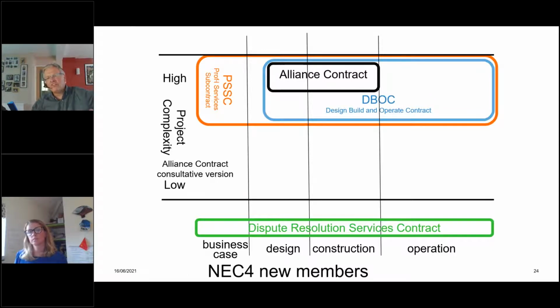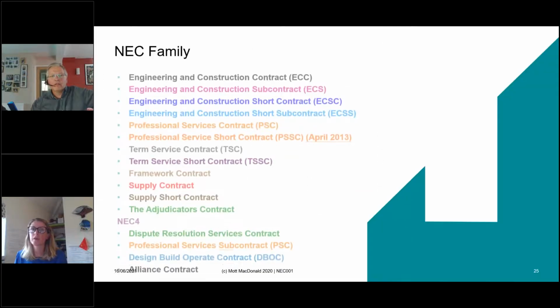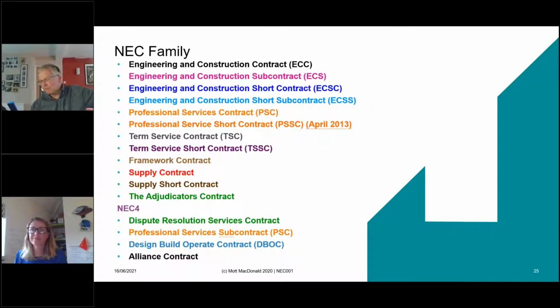That latter one is the only one that's different because it's actually a multi-party contract. Everybody is in the same bed together, signed up to the same obligations, benefiting and meeting the same performance requirements. And then the alliance contract sets out how those parties will share the gain of coming in under and the pain of going over. Very, very flexible, and that's starting to be used on the mega contracts. So that's a takeaway.